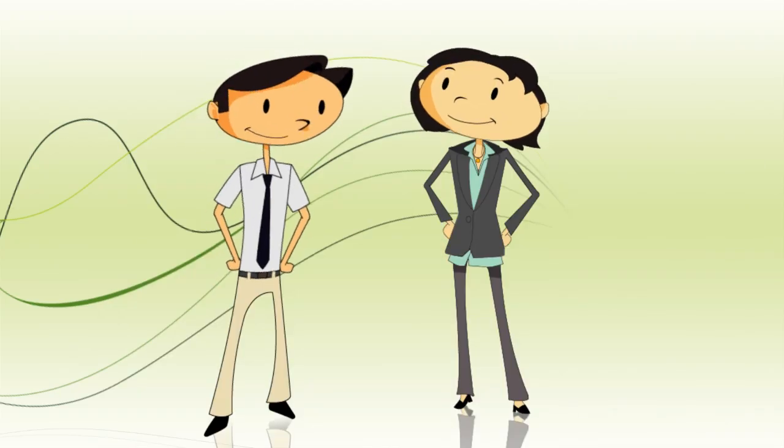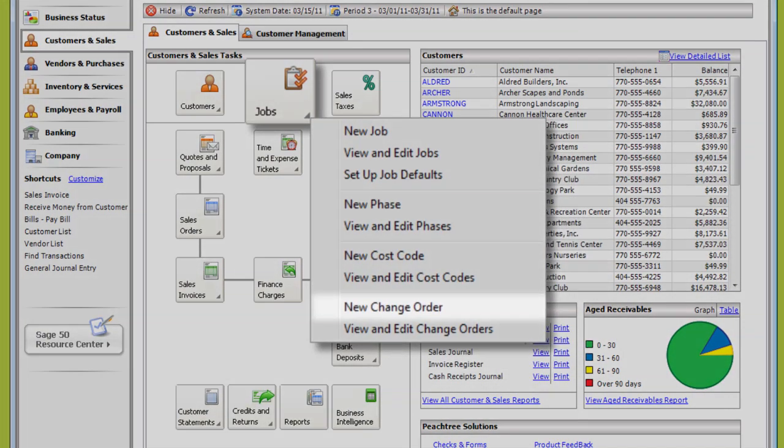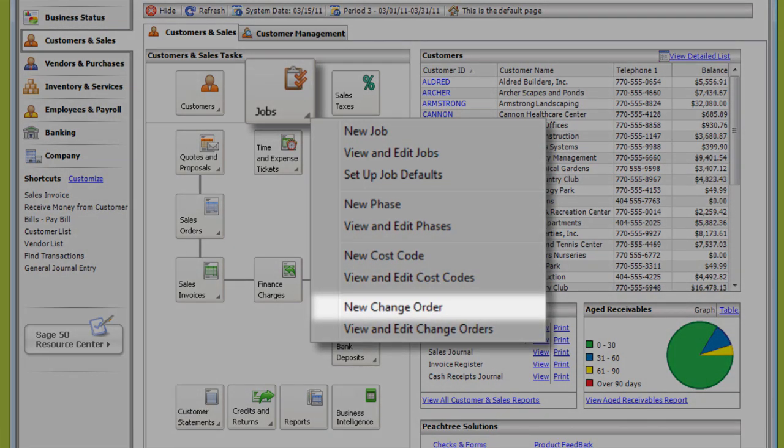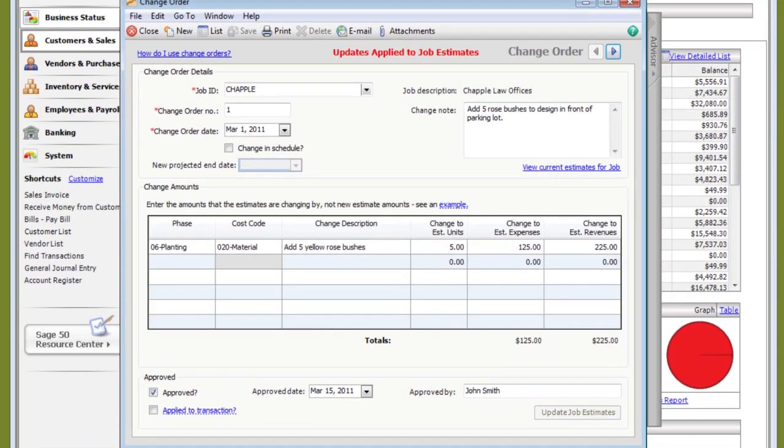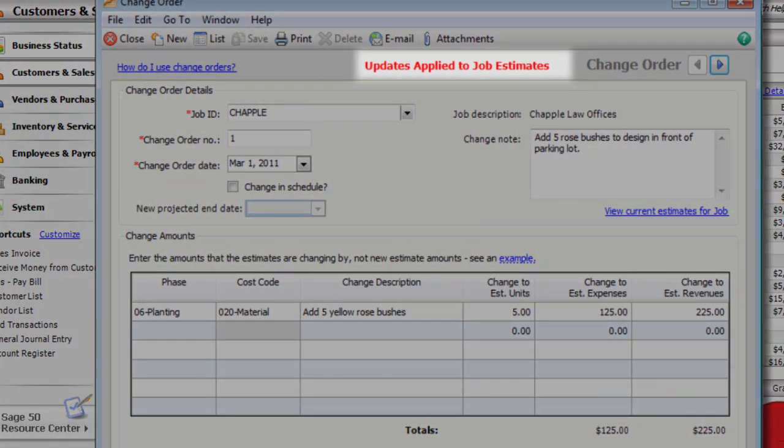Sometimes I have to revise my revenue estimates. No problem. Just create a change order to record those revisions. When change orders are approved, the changes are automatically applied to job record and job report estimates.